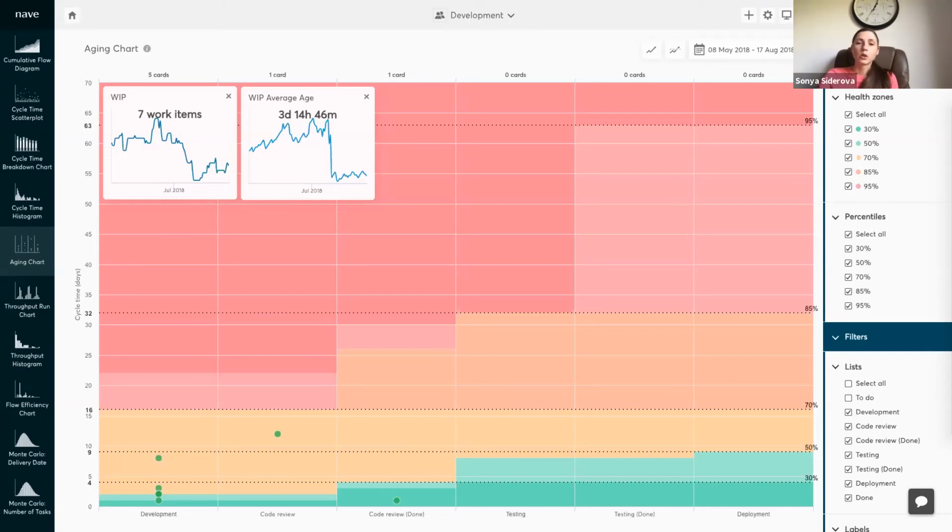According to Little's law, maintaining a stable system depends on two main factors: your work in progress and your average age of work in progress. For these two metrics, the key is consistency. Predictable systems are determined by keeping both your WIP and the average age of your WIP consistent. The average age of WIP and cycle time are essentially the same metric, only cycle time is measured against completed tasks, whereas the age of a task is a measure concerning tasks that are still in progress.